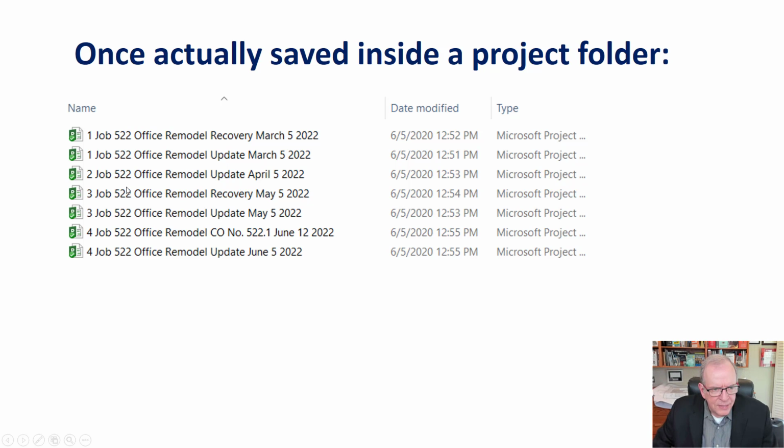This is kind of the missing link that I find that people have trouble visualizing. Well, this is your recovery now. So it's the new plan. So next month when you update it, you should update it based on the new plan. And you just use that and just change the name in the file.